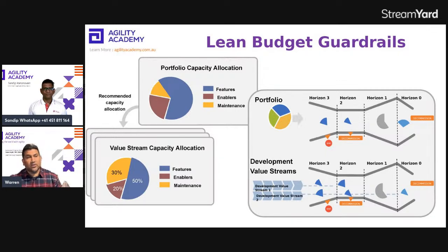Then after that, we will look at approving significant initiatives. Now, why we are talking about this is there are some initiatives that probably don't need to go up to the CEO level. That can be managed by your agile release train team, or your release train engineer, or somebody above them, like your solution train engineer. But there are some initiatives that are not consistent, not continuous delivery, and need strategic thinking behind them. You can't just put your hand into it. So there is that approval stage, where the leadership will look into it. Do we get into this market? Do we not? Is it going to be viable for us?